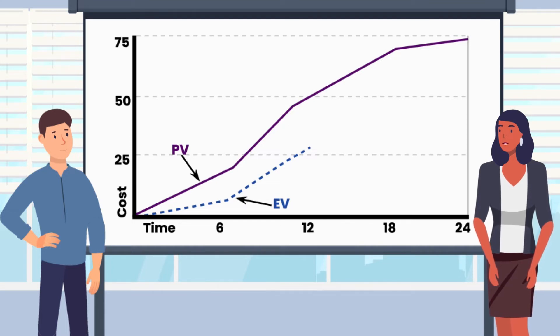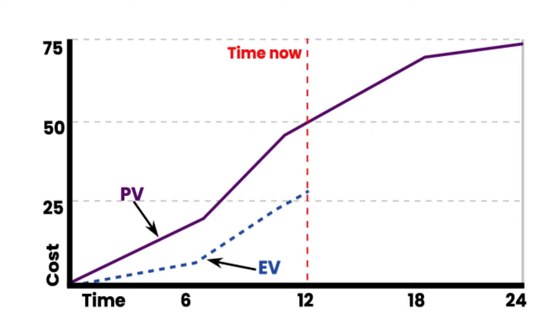The time is now 12 months since the project began. So how are we doing? It's evident we did not get as much done as planned. You're right. The EV is less than PV.